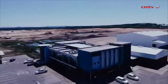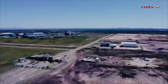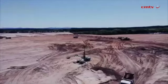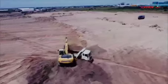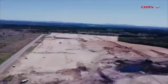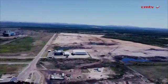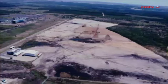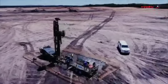We're building that titanium plant in two phases. We had to do a mini equity close where we had to find sources of funding to start with the construction of the bulk earthworks, primarily site leveling, clearing, and doing the detailed geotechs, because we've got the loads now. And that is what we started in August. That should run until August or Q2 next year.